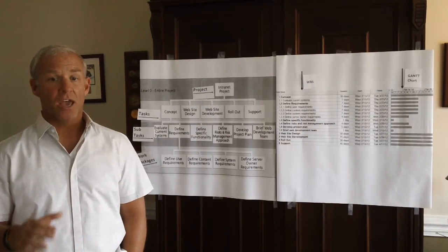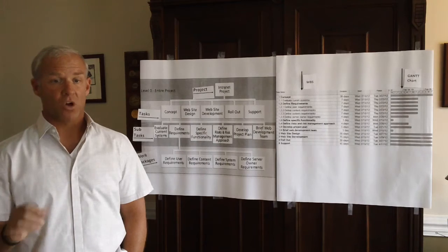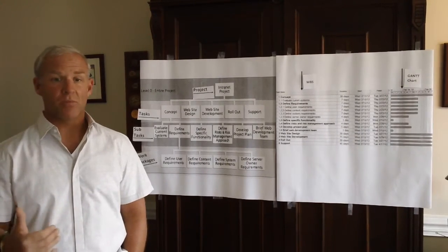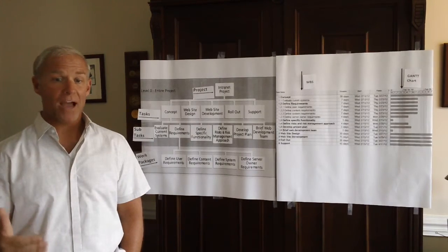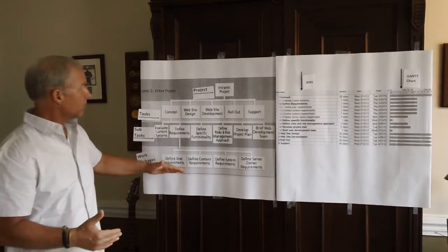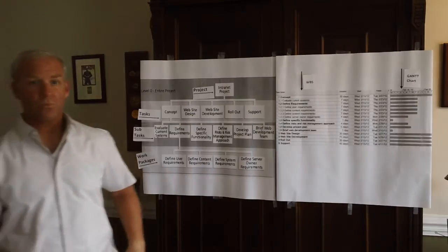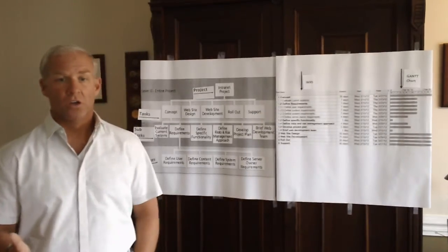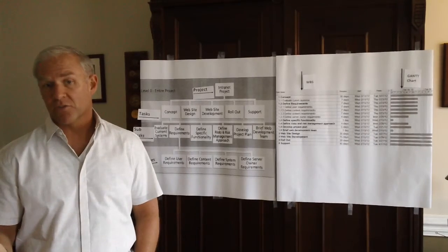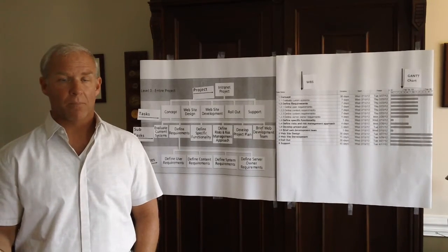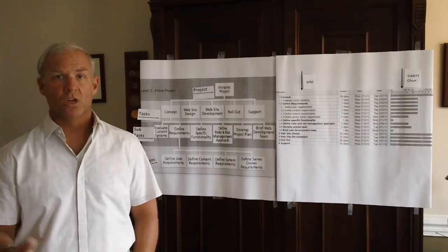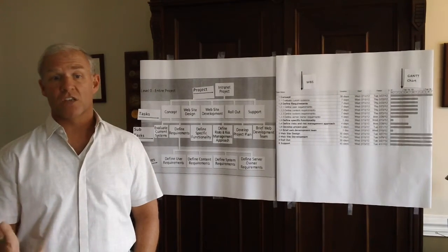The WBS makes the deliverables more precise and concrete so that the project management team knows exactly what has to be accomplished within each deliverable. This also allows for better estimating of cost, risk, and time, because the PM can work from the smaller tasks back up to the level of the entire project. And third, it allows the PM to double check all the deliverables with the stakeholders and make sure that nothing's missing or overlapping.